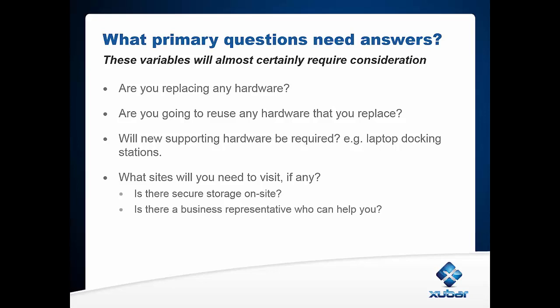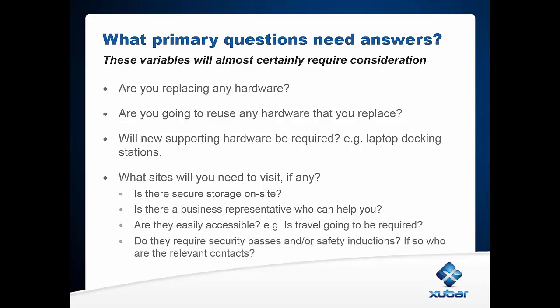Always a great idea to get the business to supply some people with local knowledge or organisational knowledge. Are they easily accessible? Is travel going to be required? Do they require security passes or safety inductions? If so, who are the relevant contacts and what are the lead times? You want to make sure you get those done early, which means you need to be able to schedule and plan your rollout effectively.